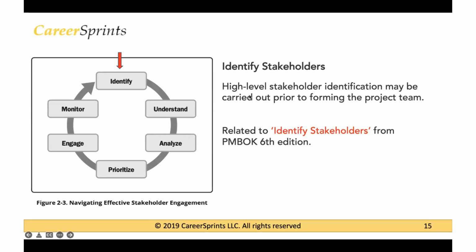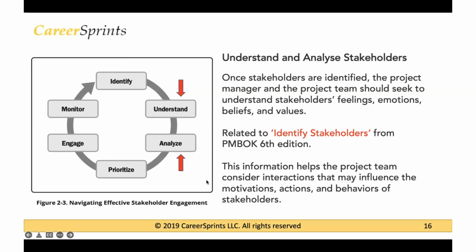So if you see, it says high level stakeholder identification may be carried out prior to forming the project team. So you just need inputs from different people. So you would need to identify some stakeholders. Now, the next step is that you understand and analyze your stakeholders. Like I had explained earlier, you can use different types of models, for example, the salience model,